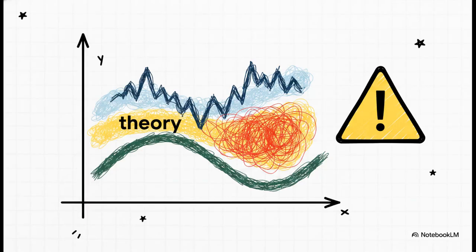And this brings us to a fundamental truth of project management. The gap between that theoretical shortest duration and the realistic resource-constrained duration, that gap is your honest risk. You have to know exactly what that risk is before you can even attempt to manage it.